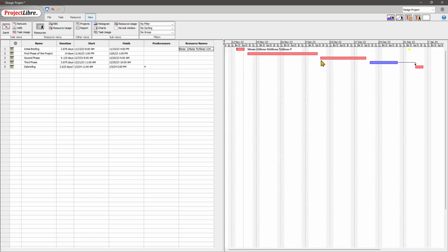Okay, now let's say that these are not perfectly one after the other, but they kind of overlap like this a little bit. Okay, so they overlap, but also I want to make this a little bit bigger, so click and drag, there you go. But I need to finish those, and these are like two parts that can go together, but I need to wait for them to be finished both until I reach this third phase. So what I can do, well, I can either click again and drag down and link, or I can just hit Ctrl Z to go back.